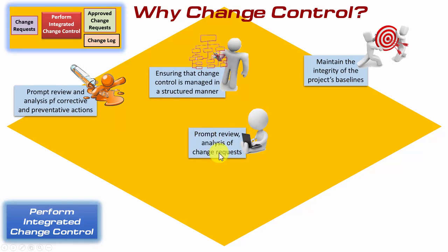Prompt is important because any delay in progressing change requests can be catastrophic. And by the way, in case it isn't obvious, change control within the PMBOK guide is not there to prevent changes, but rather to ensure that changes are only implemented once they have been properly reviewed, options checked, and the appropriate authority given for them to proceed.